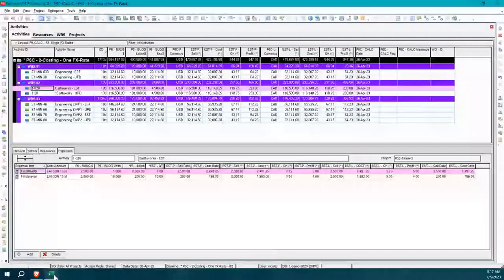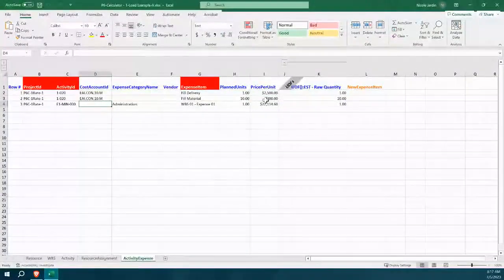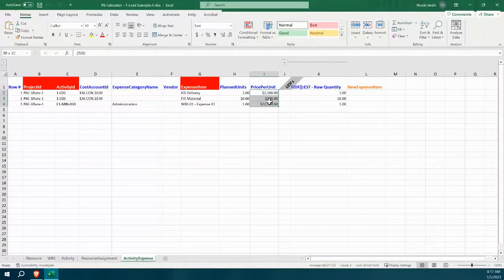So when I'm creating a brand new project, this is what I need from the estimating team to load expenses. So it's a very simple way of getting the data. This is something you can standardize. With our clients using these tools, it's all standardized across the two groups. So when I'm estimating a project and when we win it, we load the sheet very quickly from one system to the other. That way you can kick off your project very quickly.